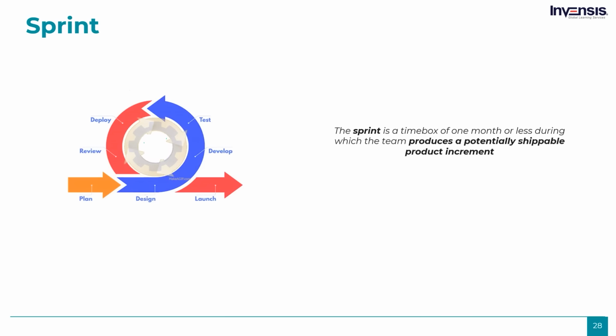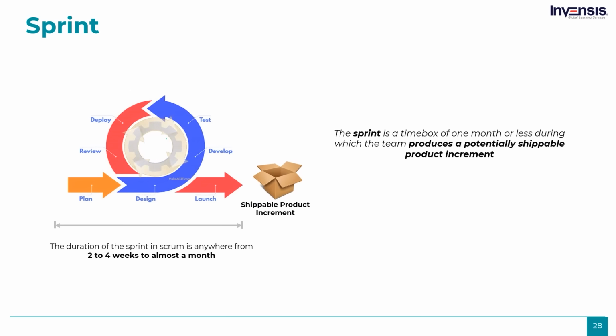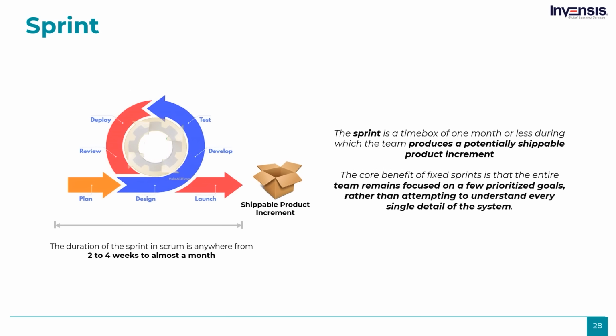The first component that we have is sprints, or at times referred to as iterations as well. An iteration is a fixed time period during which the development takes place. This means everything happens during an iteration: analysis, design, coding, testing. Typical iterations last 1 to 2 weeks, however, some may go as long as 4 weeks, and at the end of every iteration a working piece of software is delivered. As you move forward, the idea is to continuously repeat these iterations until your product is feature ready.